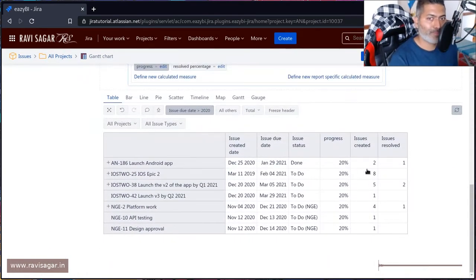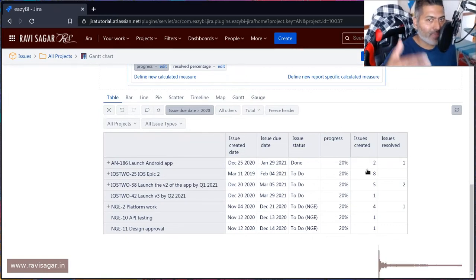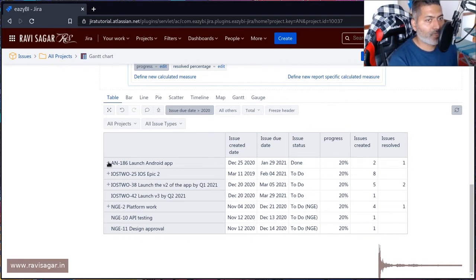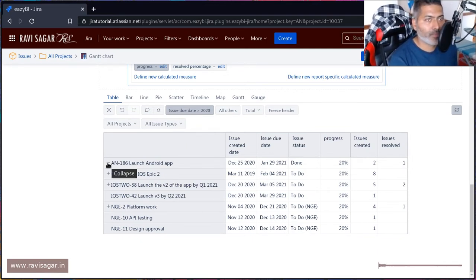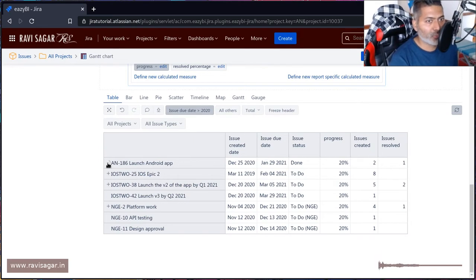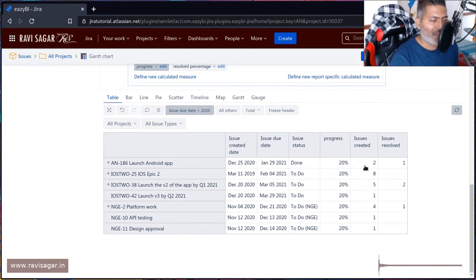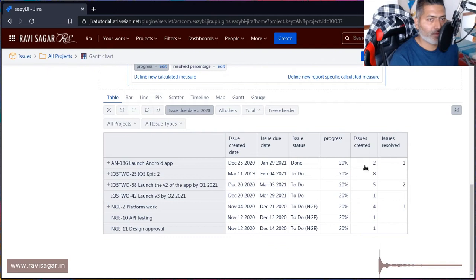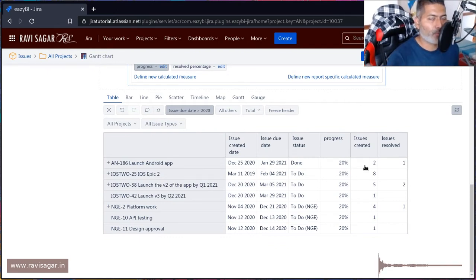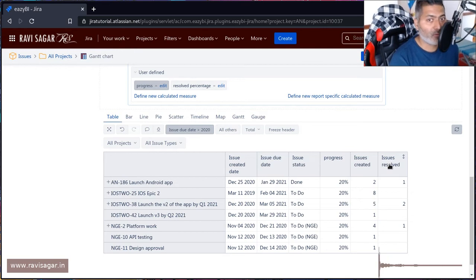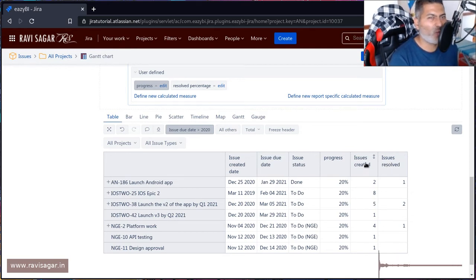for cases where you have epics and stories. For example, if you're looking at AN-186, this particular issue might have further issues under it. Maybe you want to display them on the report, but what I want to know is number of issues created and number of issues resolved. I want to create a progress measure - this progress could be a simple division: resolved issues divided by created issues times 100. You don't have to worry about the percentage, because if you look at this